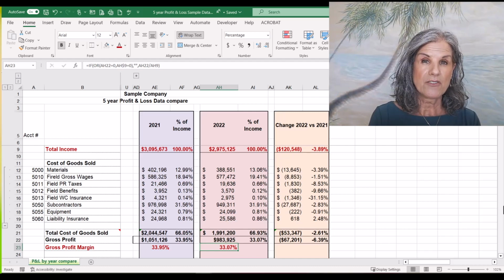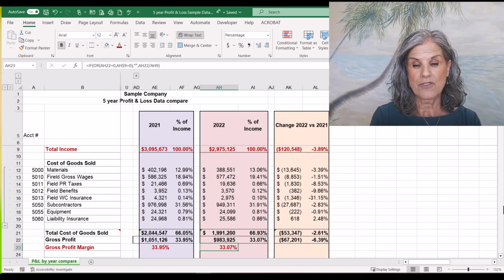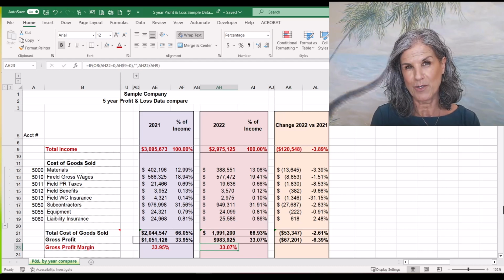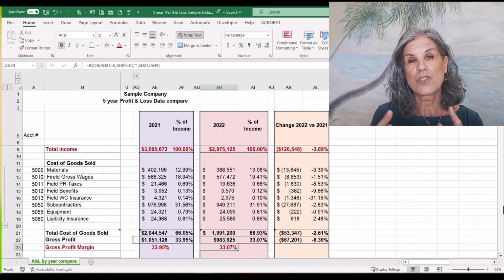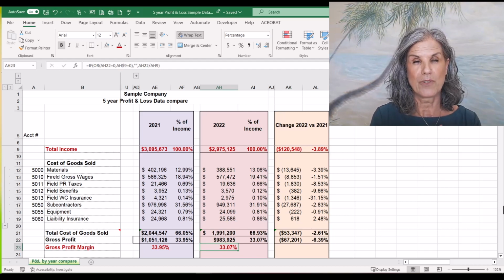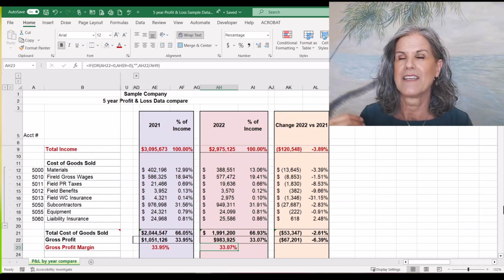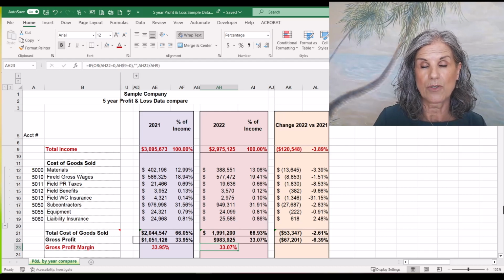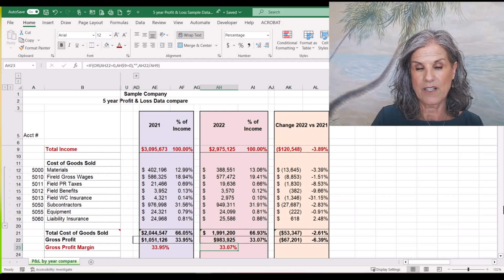If you are a subcontractor, you're going to average somewhere between 40 and 45% gross profit margin, because most of your cost is in labor, and labor always has a lot more risk associated with it and a lot more markup associated with it. But also, subcontractors have a higher overhead cost structure; it just costs you more to run your business. So general contractors tend to have lower gross profit margins than subcontractors.